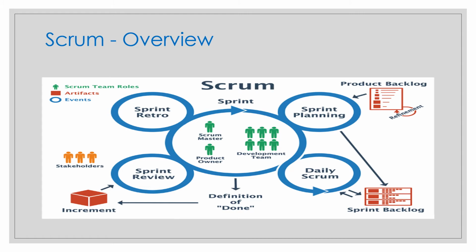In general, we have found that smaller teams communicate better and are more productive. If a Scrum team becomes too large, they should consider reorganizing into multiple cohesive Scrum teams, each focused on the same product. Therefore, they should share the same product goal, product backlog, and product owner. The Scrum team is responsible for all product related activities from stakeholder collaboration, verification, maintenance, operation, experimentation, research, and development, and anything else that they might require, right?